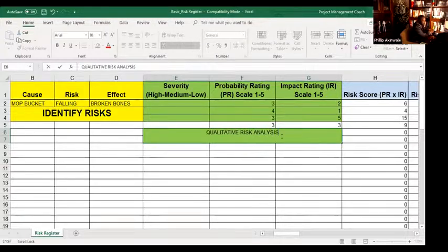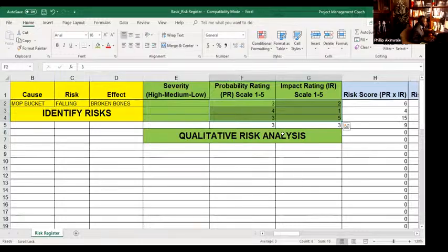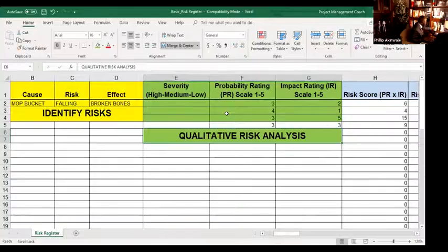So when you put in your numbers on a scale, you are not quantitative. Don't let the question trick you by saying, oh, you got numbers 1 to 10. It's still qualitative. Why? Because anyone could say on a scale of 1 to 10 on my project, it's a 3. Is a 3 the same on my project as it is on Jason's project? No. What about Donna's project? No. They all have a relative ranking system. That's what it is. So it is qualitative.